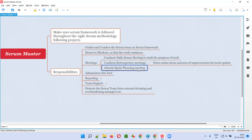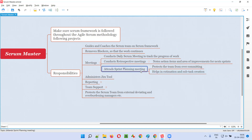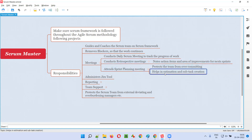The Scrum Master will also attend the sprint planning meeting. Before product backlog items are assigned to the sprint backlog, a planning meeting is conducted by the product owner. The Scrum Master attends this meeting and protects the team from over-committing. If the product owner assigns too much work, the Scrum Master will raise questions such as 'Are you sure you can do all this?' to prompt the team to re-evaluate. The Scrum Master also helps the team with story estimations and subtask creation for each story in the sprint planning meeting.